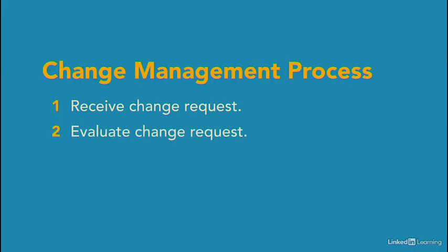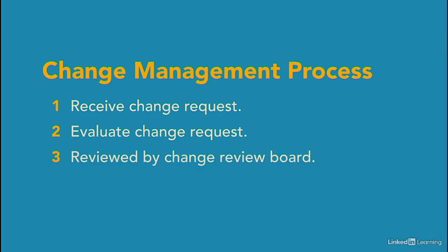Next, someone has to evaluate the request and estimate its impact. As project manager, you can assign this task to someone on your team. The evaluator determines whether the change is needed. If it is, the person evaluates whether the suggested approach is correct or if an alternative would be better. The evaluator estimates the effort and cost the change would require, the impact on the project, and whether it introduces risks. Third, the Change Review Board reviews evaluated change requests.